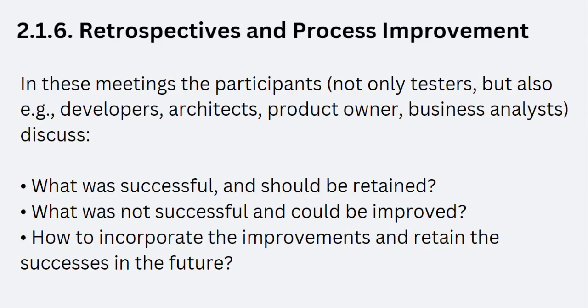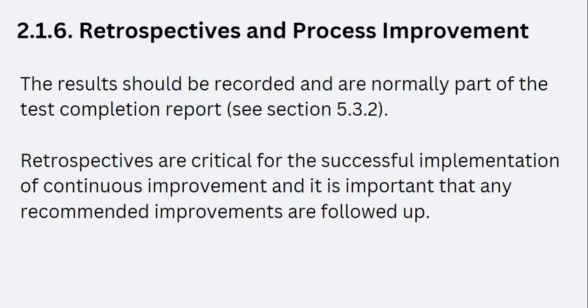In these meetings, the participants, not only the testers but also, for example, developers, architects, product owner, and business analyst, discuss what was successful and should be retained, what was not successful and could be improved, and how to incorporate the improvements and retain the successes in the future.